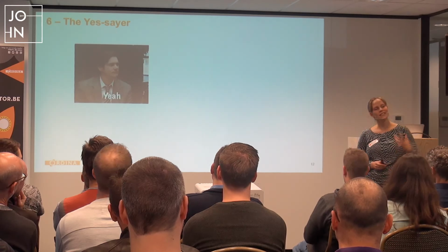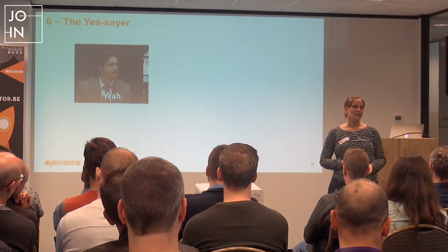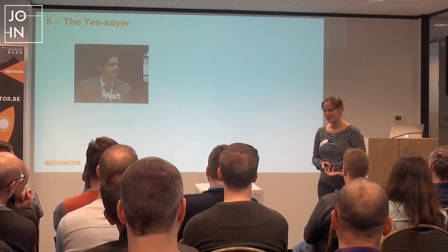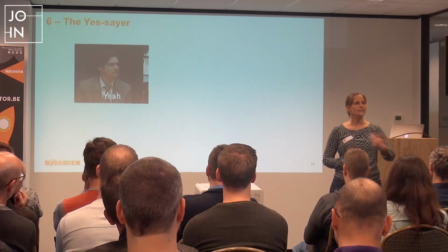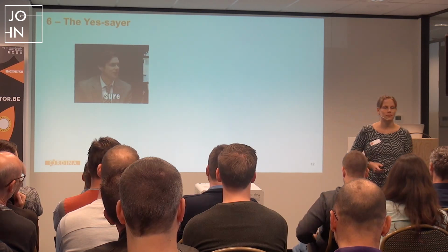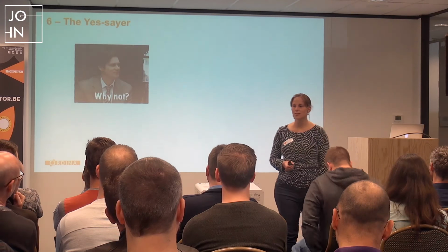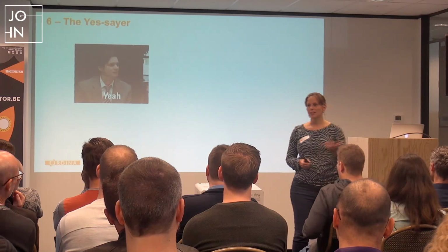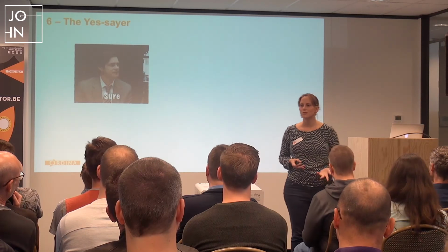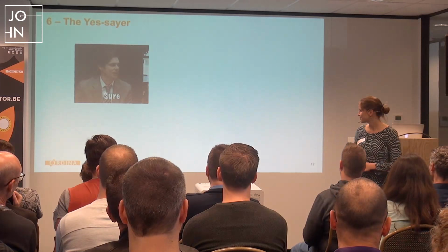disadvantages. One is speed of decision making. And in Agile, we need fast decisions. If we don't have one person that can make a decision, it's often worse if he doesn't make a decision than if he makes the wrong decision. You can rectify a wrong decision. You notice because you have the feedback loop with the customer enabled. If he doesn't make a decision, it never gets released. You don't have any feedback. You still don't know if the decision was right or wrong. That's why we have one person in Scrum.